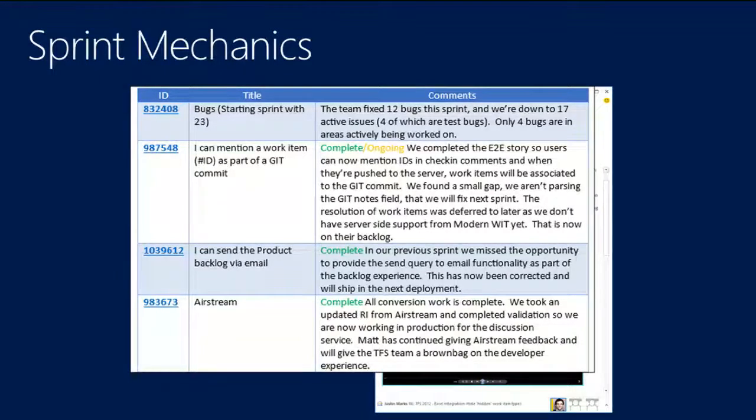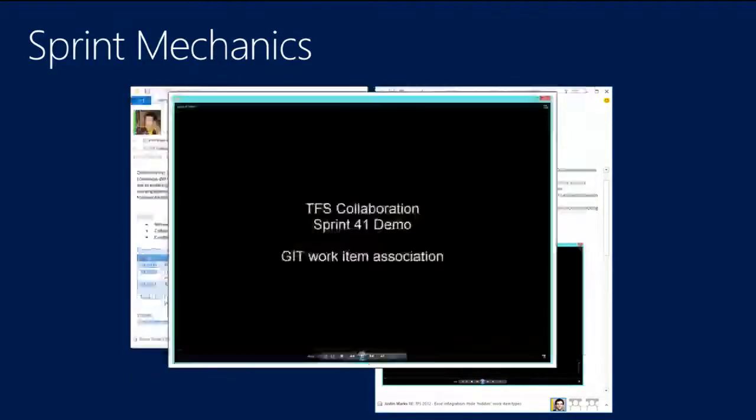But what I will say you should not do is just start randomly moving tasks into the next sprint. That's a bad idea. And what I want you to do most of the time is move the whole story. Breaking stories up is kind of a bad practice, I think. And so if you can, move the whole story. But we can talk about that in detail later. Okay, and then we do these videos.